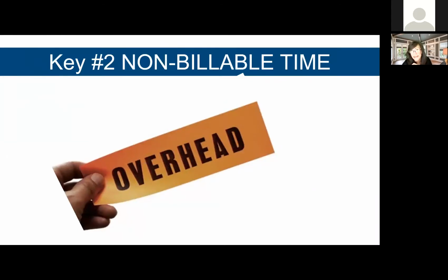If your overhead is higher than what your company is targeting or estimating in your budgets or in your billing rates, then you can even actually be losing money on every hour that your employee works, especially if you have time and materials projects. Because if your overhead is too high, you didn't build that much overhead into your billing rates. That's really going to affect your profit.